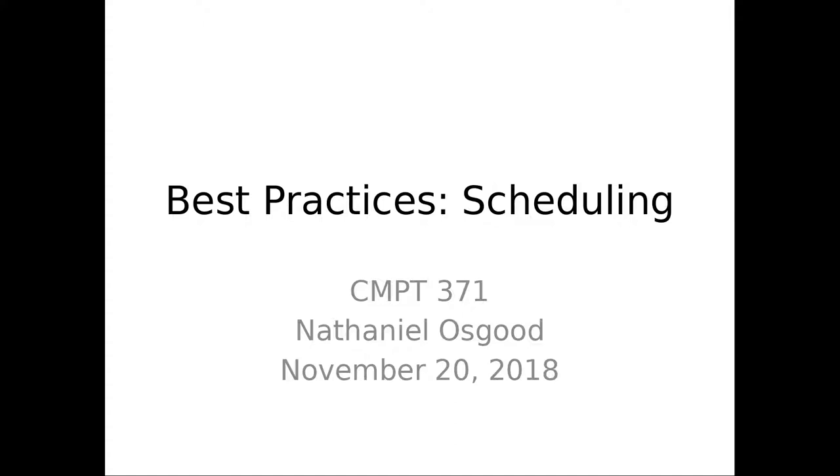I also want you to know something about the notion of float or slack, okay, not as the system that you use to communicate, but in terms of how much leeway you have with tasks. And critically, no pun intended, I want you to understand the concept of a critical path, because that's absolutely central for understanding prioritization of different tasks within a project. The basic deal will be that certain tasks are much more important to hop on than others, because they are in the critical path, meaning that if they're delayed, it's going to delay the whole project. Other tasks will have leeway, will have float, will have slack. In other words, you could delay them without delaying the project as a whole.